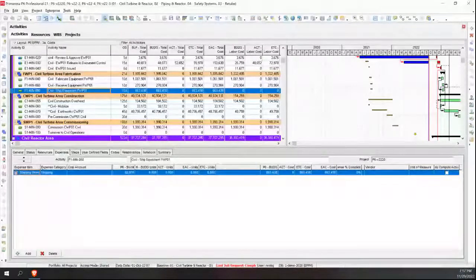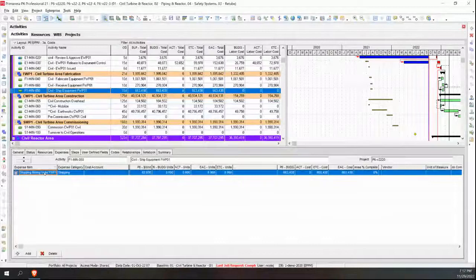So in this example, we have some mining, shipping, and we have a fixed rate usually for that. Okay, so in this case, we're shipping 8 units, and we've got a total of 82,000 per unit, and we've got the budget there that's being calculated from those two.